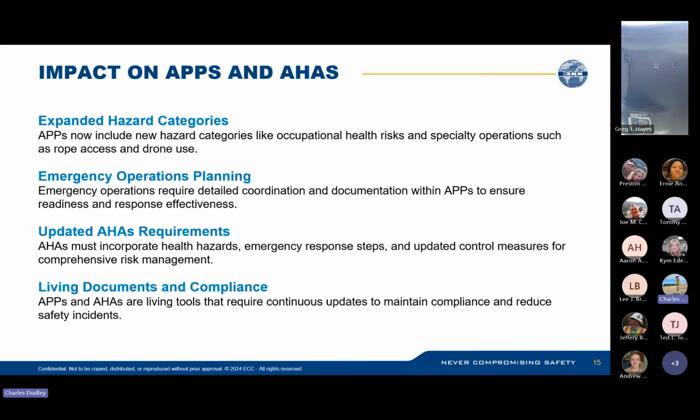The big one that's going to get us all caught in the field are the AHA requirements. So the AHAs now have to incorporate health hazards, emergency response steps, and control measures for the entirety of that activity. Okay. Obviously, the APPs and the AHAs, I'm sure you've seen Kim's emails in the last month or so that we're updating APPs, and we need to be going through the AHAs to make sure they're maintaining compliance and doing their job at reducing safety incidents.